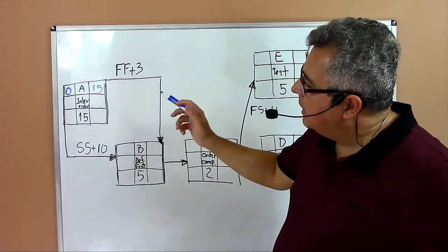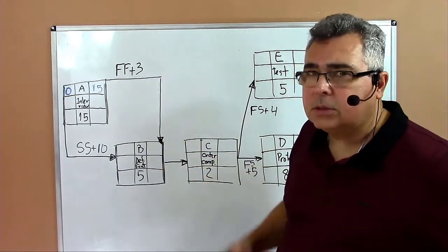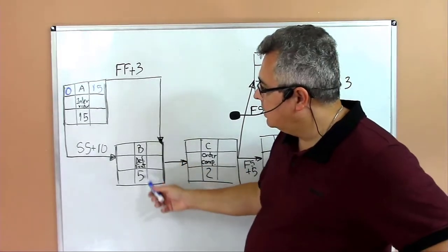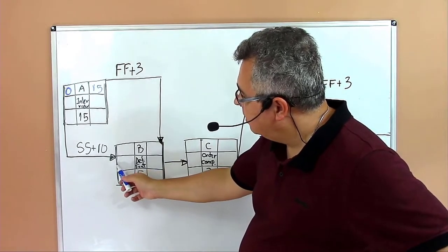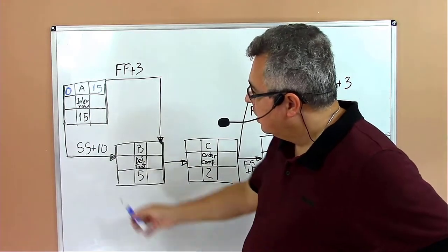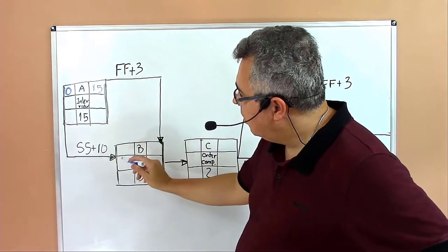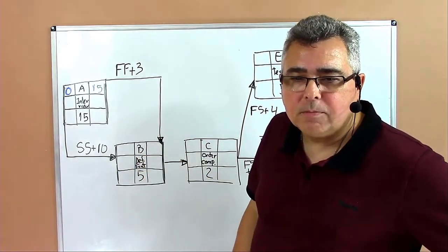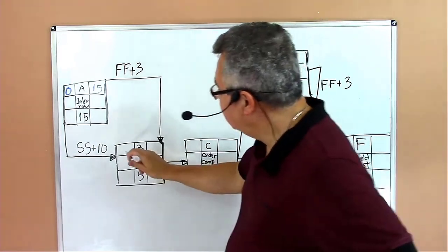Now let's start computing the times for the other tasks. Let's continue with activity B. On activity B, there is a connection between the starting of activity B with the starting of activity A. So here we have a start to start, but there is a delay of 10. So what is the early start for activity B? Who knows? Who can guess that? 10, yes, 10. Thank you.